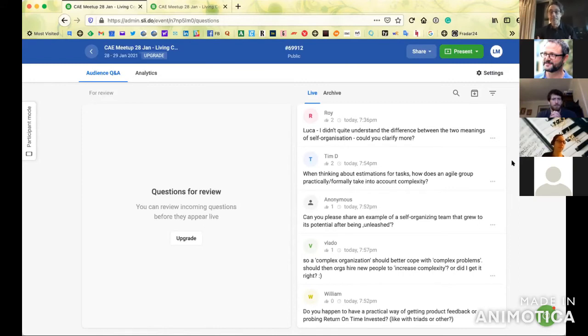What do these give you in terms of estimation? Well, it's going to tell you that number 4 and number 5, you cannot estimate. Those are like extreme experiments. You need to do probes before. You just have to try to identify the problem, to build certainty, and then you can estimate. You cannot go to a client and promise a length. In agile terms or in extreme programming terms, those are candidates for spikes.